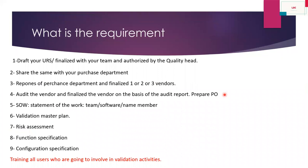So in a short way, let us see the documentation requirements. First, initiate your change control. Draft your URS (User Requirement Specification), finalize it with your team — sit together with your quality team and check and finalize the URS, then authorize with the quality head. Share the URS with the purchase department, who will search for vendors and finalize one, two, or three vendors. Audit the vendor and finalize based on the audit report, then generate the purchase order. After this, prepare the Statement of Work.